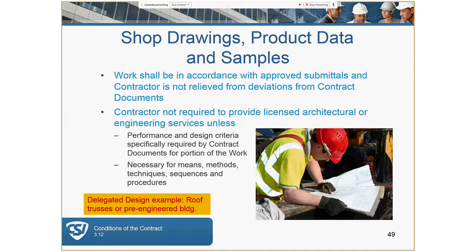There are some instances where the contractor might be required to provide engineering services — for exterior windows or a pre-engineered roof structure, for example. That's typically spelled out in a performance-type specification. Even if the spec does not say it's a performance spec, it might simply list the requirements or parameters to be achieved, with a requirement for signed and sealed engineering drawings. Another example might be a fire-rated joint system or a support system for equipment.